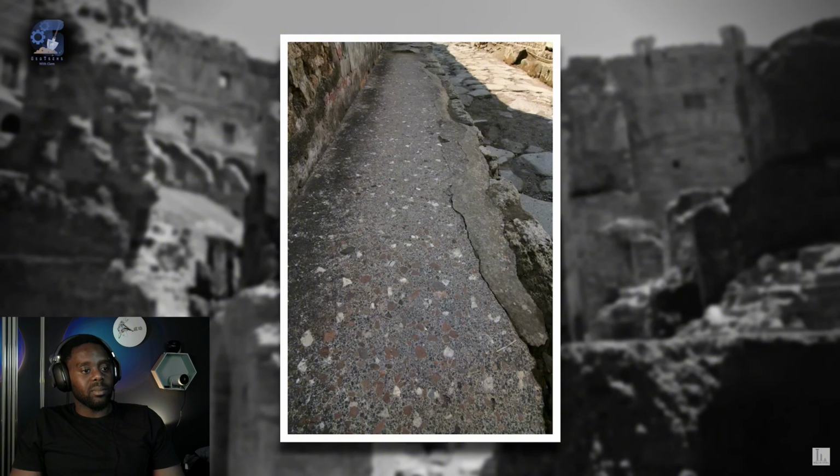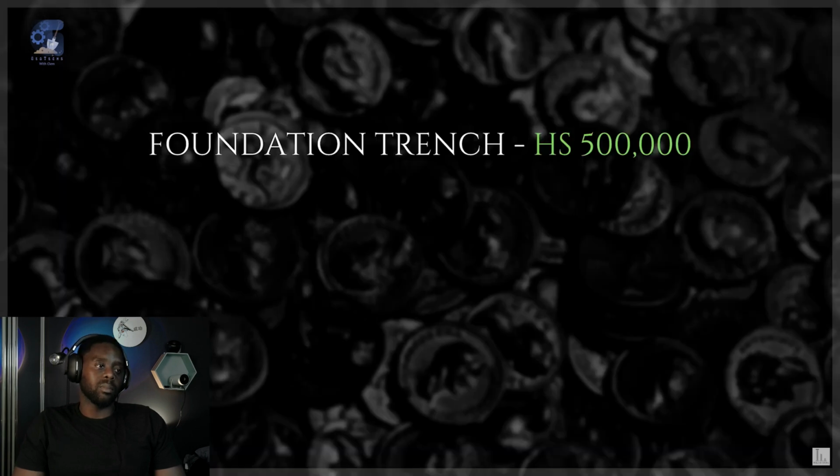Besides its strength and durability, Roman concrete had the great virtue of being cheap. All the materials were available locally, and, unlike masonry, a large concrete structure could be built largely with unskilled labor. By my best estimate, the upper and lower foundations together used roughly 250,000 cubic meters of rubble and concrete. Again, following Janet Delane, who wrote an article on the relative costs of different kinds of Roman construction, I estimate that each cubic meter of concrete cost the equivalent of 10 days' wages for a laborer. By our equation, that gives a total of about 10 million sestertii for the foundation.